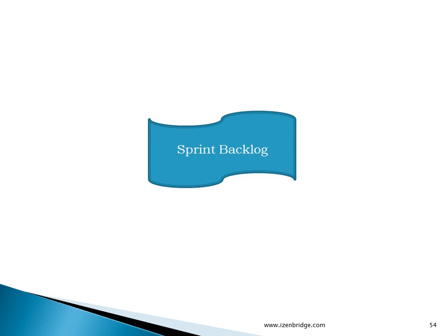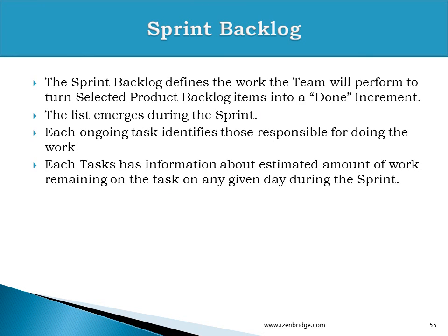Sprint backlog. The sprint backlog defines the work the team will do. It is a collection of engineering tasks, and this list is also emergent during the sprint. It is not that the team will only make the sprint backlog during the sprint planning meeting. During the course of the sprint, the team may find a few engineering tasks which need to be included in the sprint backlog, or they may identify a few tasks which are not required. So sprint backlog items can be deleted, added and modified by team members during the sprint.